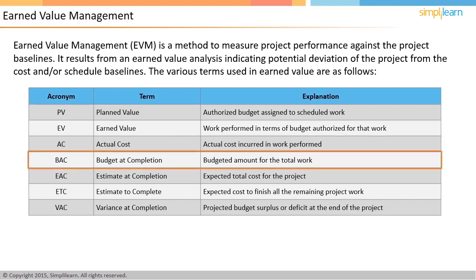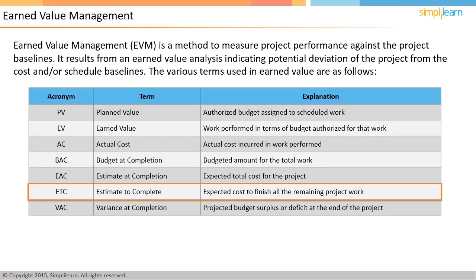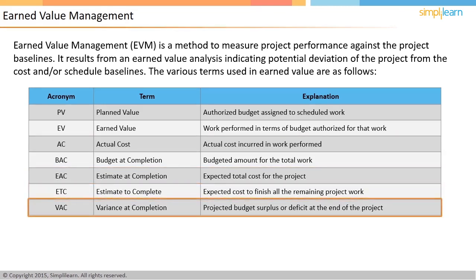Budget at completion is the budgeted amount for the total work. Estimate at completion is the expected total cost for the project. Estimate to complete is the expected cost to finish all the remaining project work. Variance at completion is the projected budget surplus or deficit at the end of the project. All these parameters are measured in terms of cost.